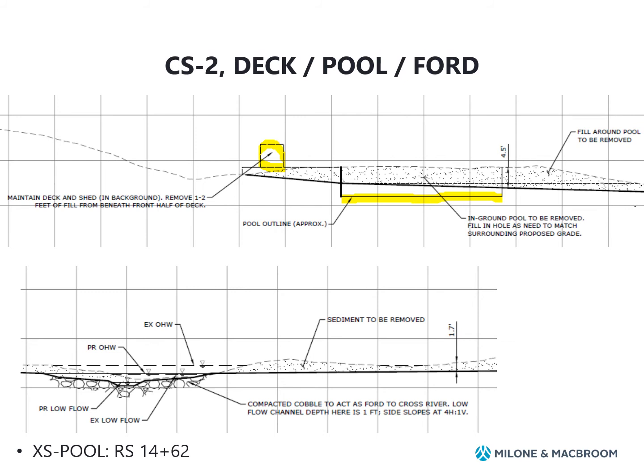At the pool, all of the pool, including all concrete and all piping, will be removed. This includes what would eventually be underground. So, even the bottom of the pool would be removed and hauled off site. Then the fill around the pool would be removed, and some of that could be used to fill the bottom of the pool hole to create a gentle slope across the new floodplain to the river.